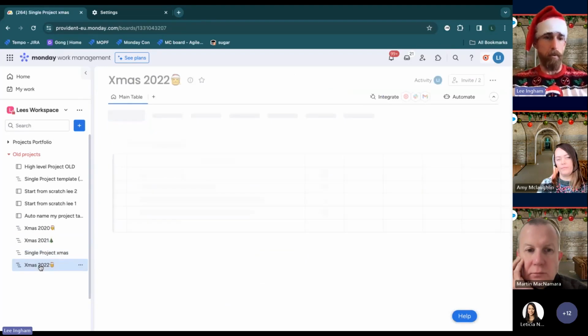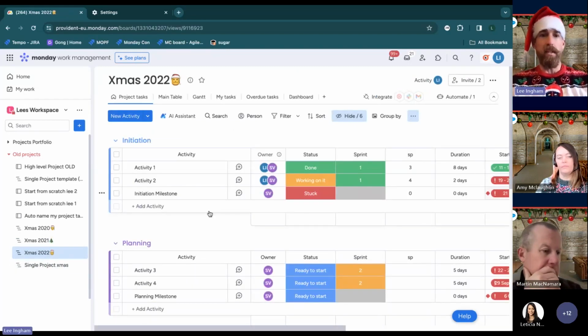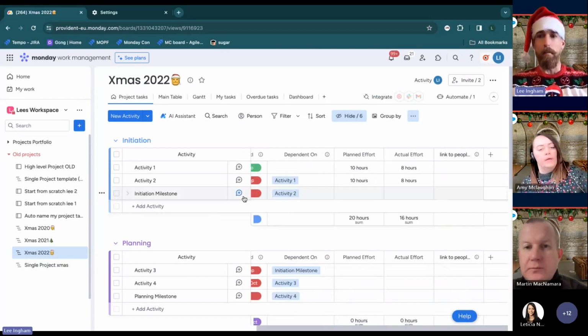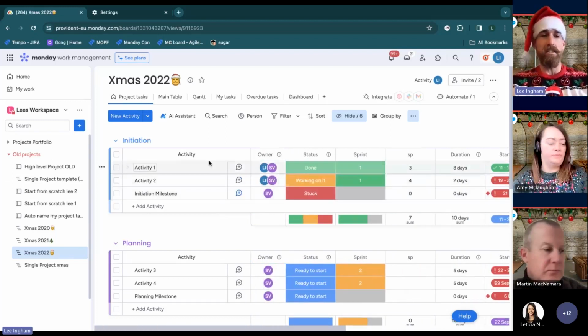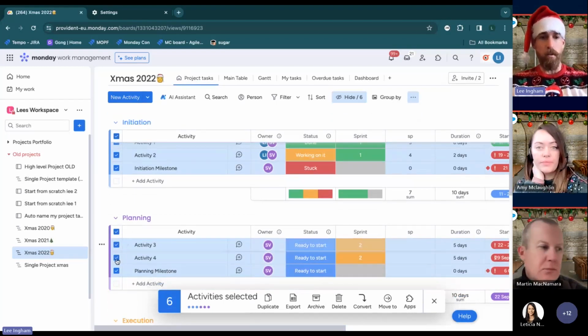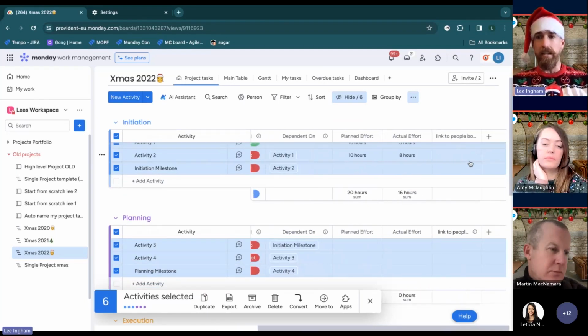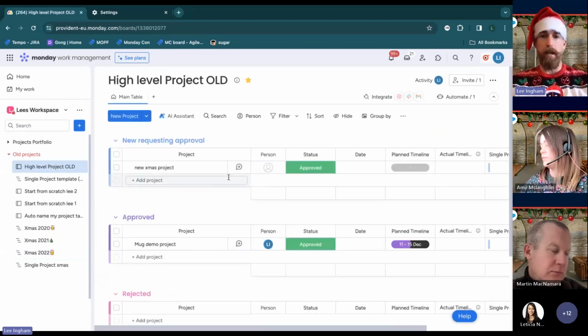So here's that board that I just wanted there, I think it is. Well, there's another one here anyway, but I want this board to actually automatically connect up to the parent board, and it doesn't do that. So the painful part is, depending on how big our templates are, we have to go down here and tick all of the different boxes, and then go and click a column to link everything back up, so everything rolls back up into the parent level.